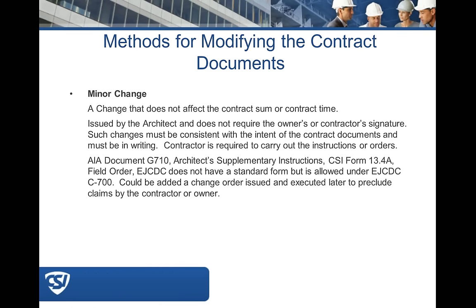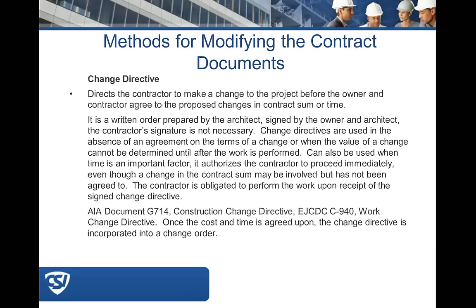We have some info from Kevin on the call, letting us know that the EJCDC field order is actually known as document C942 and is used for authorizing minor changes. The CSI standard form for the architect/engineer to authorize minor changes is also called the field order.